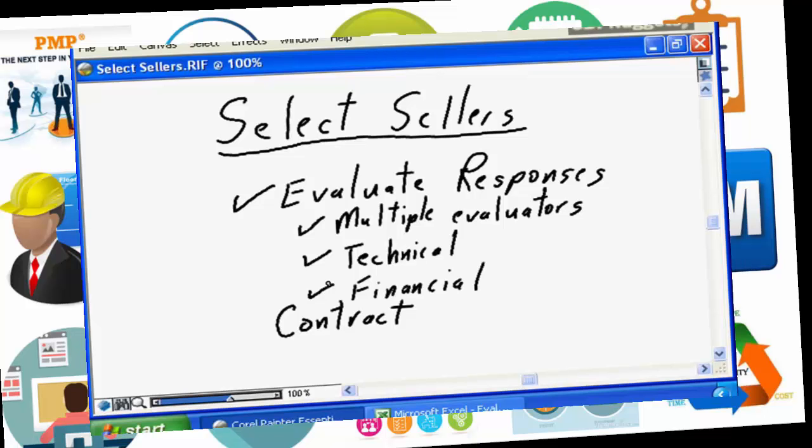But you don't want to let finances be part of the evaluation criteria before you've determined that the fit happens, because you could end up buying the cheapest package that doesn't satisfy the project requirements. And then the final step is the production of the project contract itself.